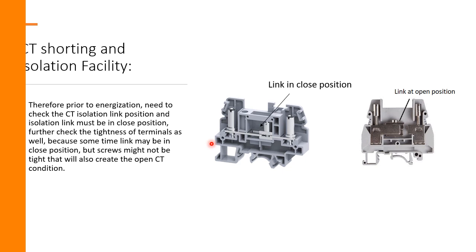Prior to energization, you need to check that the CT isolation link is in the closed position. Further, check the tightness of the terminals, because sometimes the link may be in closed position but its screws might not be tight — that will also create an open CT condition. So when you go to any panel, you have to make sure the CT link is in closed position and the screws are tight.